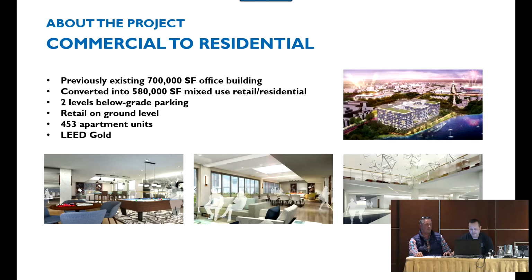So a little bit about the project itself. It was previously an existing 700,000 square foot office building. It is now being converted into a 580,000 square foot mixed use retail residential building. It has 2 levels of below grade parking. Eventually it will have retail on the ground level, and it'll consist of 453 apartment units, and they're currently going for LEED Gold. These are just a couple pictures of what it will ultimately end up looking like.